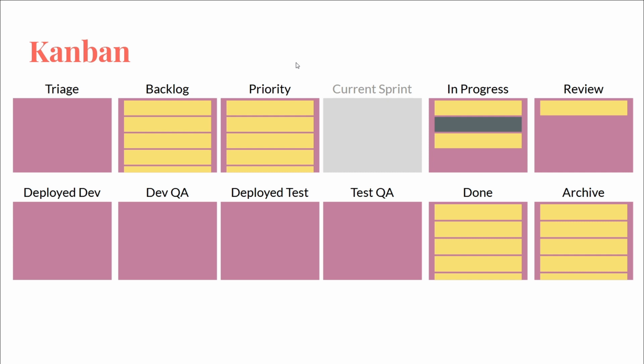That Scrum approach is typically used when you have a big project that you're working on and you have a decent idea of what this project is going to look like when it's done. Kanban is good when you don't know what the end result is going to look like when it's done. So Kanban is really useful for people who are doing exception tasks.